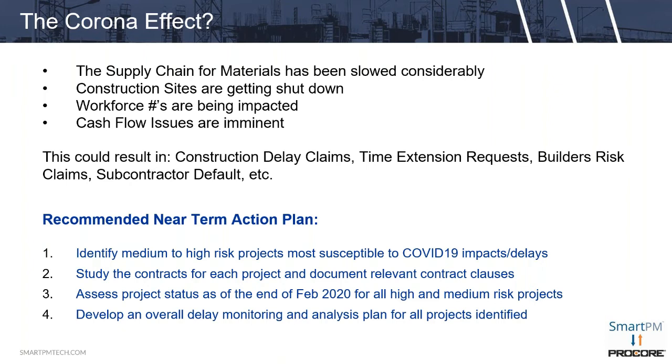After you go through that process, the next thing I would say is necessary is to make sure that you have a good understanding of the project at the time of the impact, not after. At the time of the impact. We have to make sure for all of our high and medium risk projects that we feel good about the schedule, that the schedule's not overly compressed. That there hasn't been a ton of delays that have been consumed and the end date's completely compressed, because what we'll find then is a very arguable critical path and plan going forward on a very arguable end date that wouldn't have been achievable anyway. And that is not the right way to start this process.